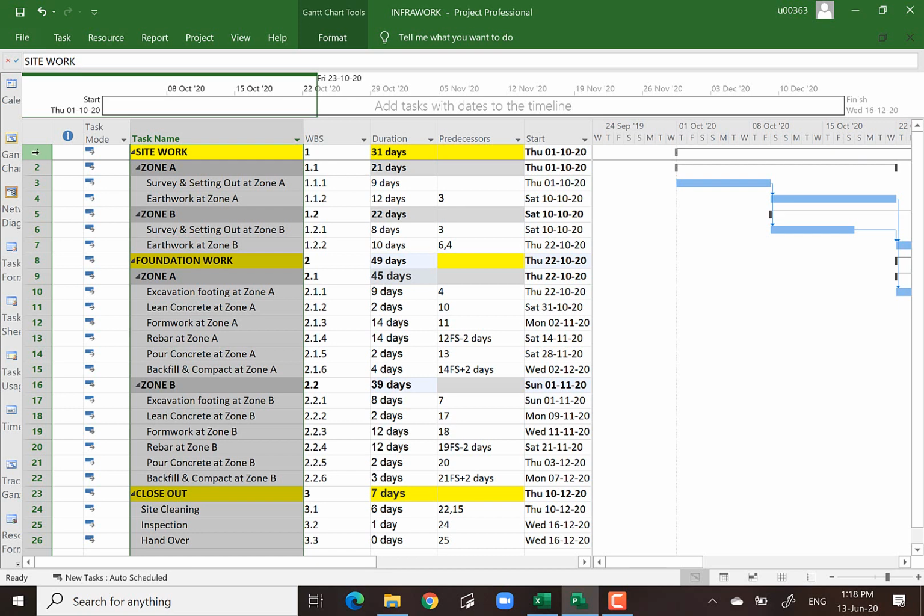This one starts from 1. I want to open up a 0 ID row. What is the 0 ID row? The 0 ID row indicates the overall project information. How do we do that?